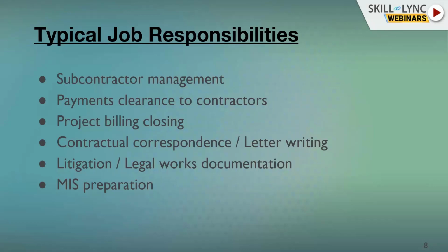The last responsibility is MIS preparation. There will be a monthly information system for each project in which there will be a chapter for cost, and most of the directors, CEOs, will be very keen on reading the chapter on the cost, stating where the project cost is going in terms of the budgeted cost, escalation, delays. So MIS preparation is also one of the responsibilities for the cost chapter for the cost controller.